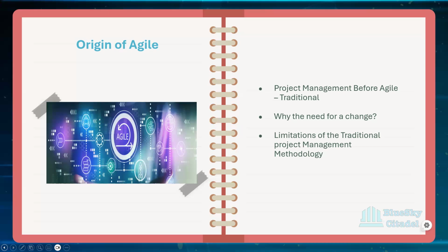And by the time the testers are testing and you call the developers back, the contract you have with them has been completed. You gave them a timeline to do what they needed to do, and they've done it. Now if you have to call them back to say that while testing, they found this fault, it goes into a lot of argument. There's a lot of time wasting.